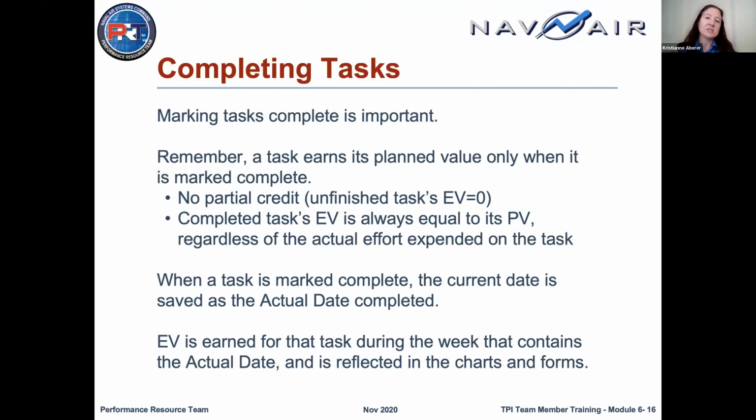Because the schedule calculations use an average earned value per week, you don't have to track down the exact day if you've forgotten it. Just get it closed for the correct week.